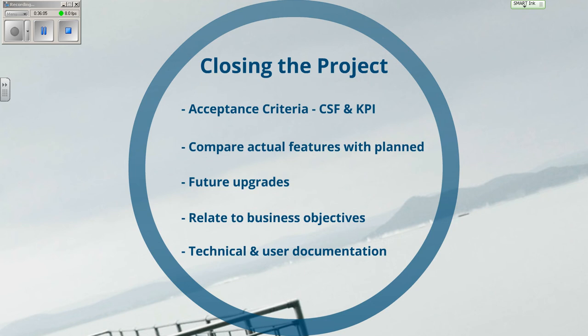When it comes to the end, you might also write a lessons log. Prince 2 gives details and structure on how to write a lessons log. So if something happened during the project that was unexpected, then you can write about how you dealt with it. And when you then do future projects, you may well draw on the lessons from the past. So yeah, risk assessment would help before the bad things happen, but then after the bad things happen, you can do a lessons log, which may well form part of your final report. I haven't specifically listed it here, but yes, that's a very good thing to include.